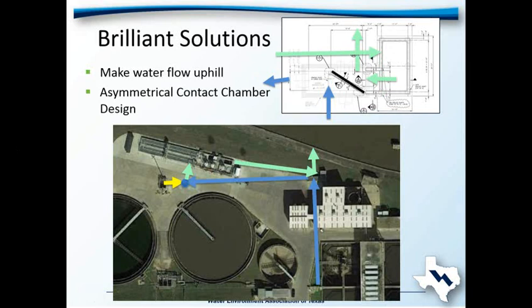In terms of permitting, we had done prior work to this, and our permit, we do not have to meet the domestic design criteria because it's an industrial treatment facility. So we actually got written into our permit the flexibility of going either with the chlorine system or with the peracetic acid system.